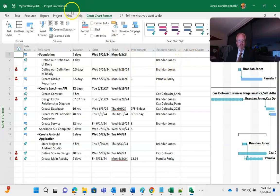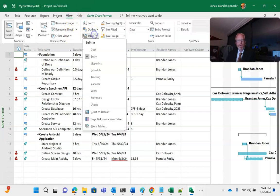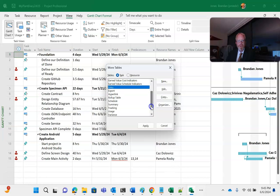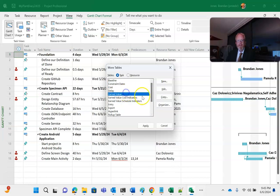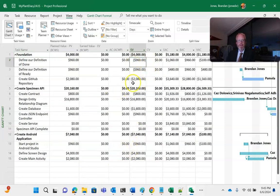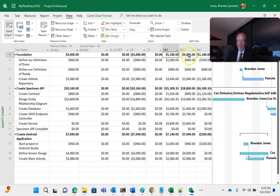Earned value is quite handy in Project although I will tell you it's just a little tricky to find. We need to go here to view and then tables and then more tables. There's a treasure here of tables worth checking out even beyond earned value, but nonetheless choose earned value and then apply. You see that this is giving us our schedule variance, cost variance, estimate at completion, budget at completion, and variance at completion.